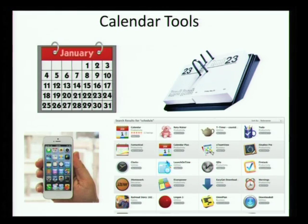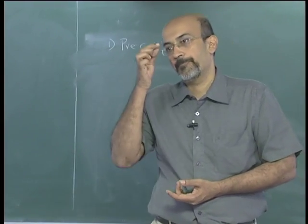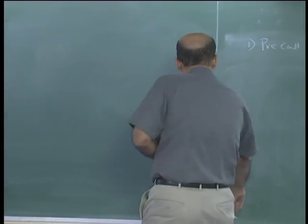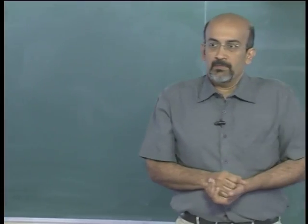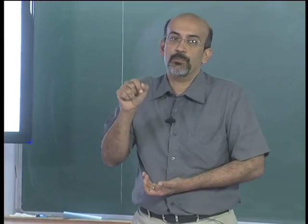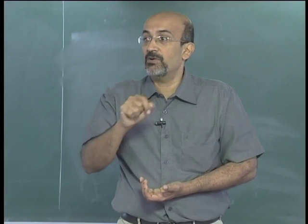I would like to take this discussion back to our earlier example — which tool would you use for what, or do you need something more sophisticated? Take the industrial lecture example: is the to-do list enough, or what would you actually use? Last time we identified the activities. For a calendar for an industrial lecture, what would you do? Starting with communication — the lecture speaker has to be confirmed by a specific date. So you take dates and say what you should achieve by each date, and you would also say when should you start something and by when it should be taken care of.